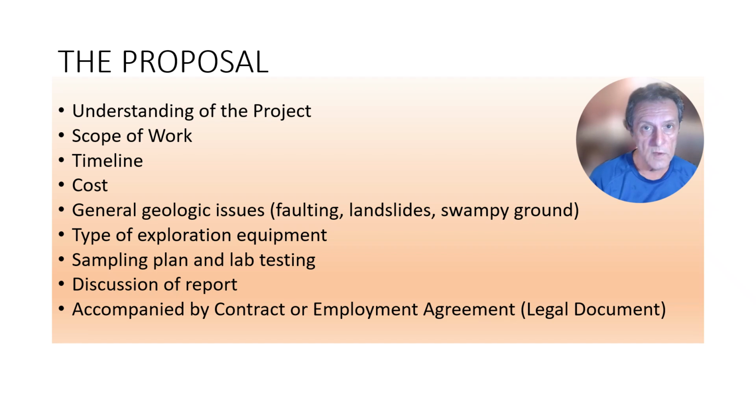And if we don't do our investigation properly for the scope of work and amount of money that we're going to spend on the investigation, you may end up paying more on the back end to correct issues that haven't been addressed during the investigation. So geotechnical investigations are critical and can often save money in the long run for the project.